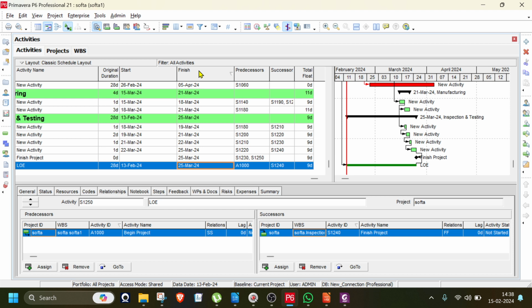Now, these ADNOC engineers or people can delay it. Normally, we start the work at 10:30, but we have to start the job at 9 o'clock. So there is a delay. In that case, what a good project manager or project team does is crunch the schedules. They make the schedules in different ways. They might say maybe we can start this particular task today itself, because it is not going to affect the critical path or any other linked task. So let us start this today.